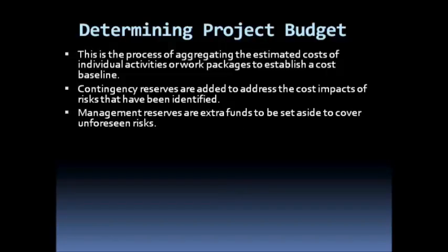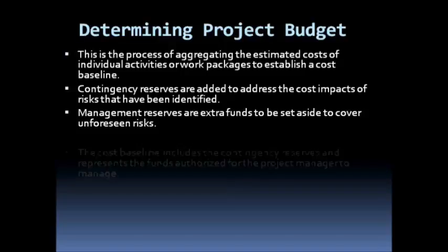Then for our project, we should always have a certain reserve predetermined by management, for instance, to be either 2% or 5% of the budget for our project. And this reserve is known as a management reserve. These are extra funds that we need to set aside to cover unforeseen risks, things that we never thought could happen, and yet they happen, and they affect our project negatively. We should have extra funds set aside to cater for such unforeseen occurrences.